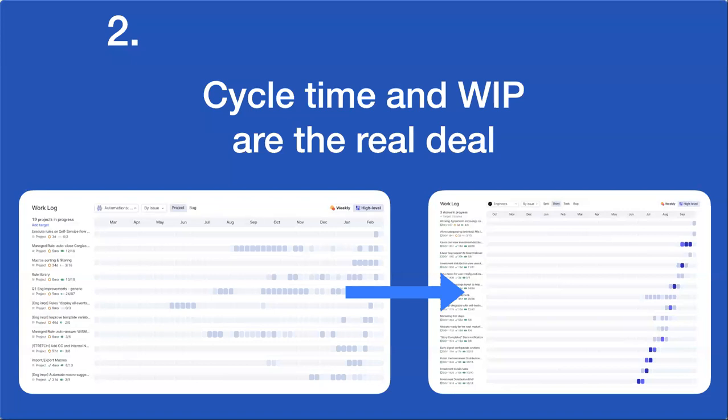And then you realize that we're actually not getting anything done because we're just jumping between different priorities, all of which are urgent. As a result, we've shipped 80% of this feature and 90% of this feature and 50% of this feature, and yet we're not getting any of those out to the customers. In fact, most likely your customers would be happier if you just shipped one thing and actually finished it, also followed up on the feedback that you're still getting after the launch, etc.